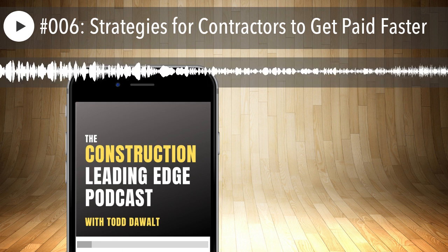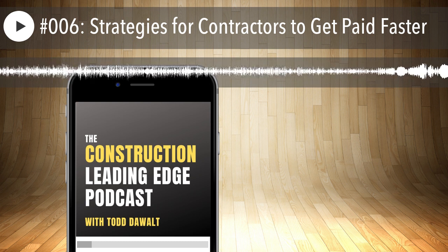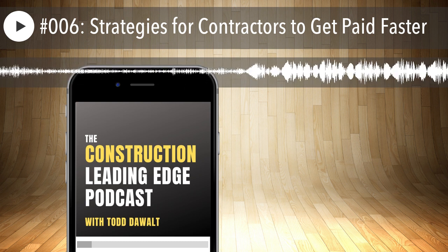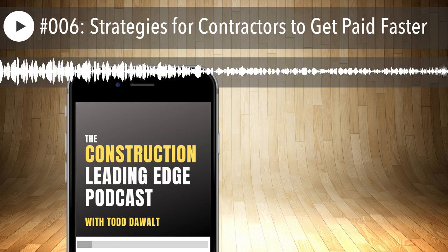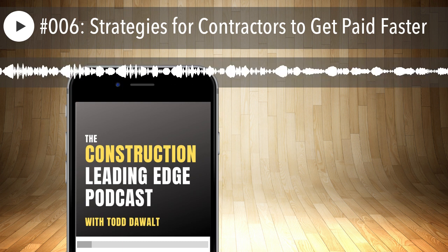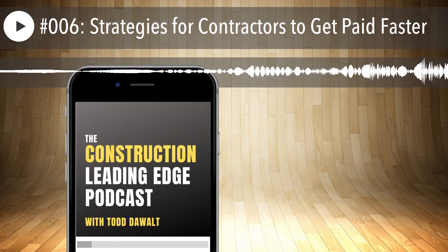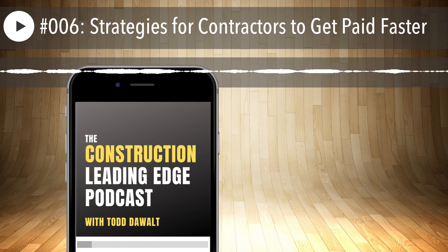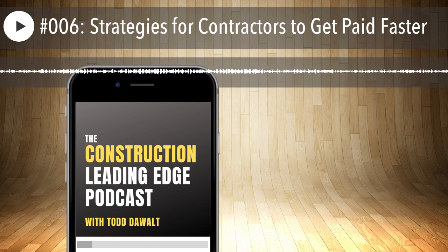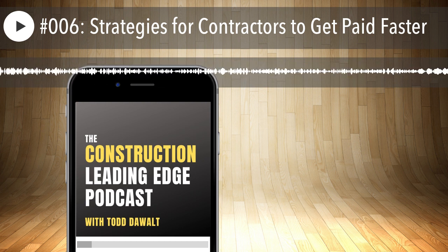I'm talking pre-construction meeting, before you do work. Develop a list of everybody who is going to affect your pay schedule. Next, schedule a pre-construction meeting or a conference call with that entire group. Get everybody on the phone, all the players, in a room or on the phone with the express intent of discussing the payment approval process.